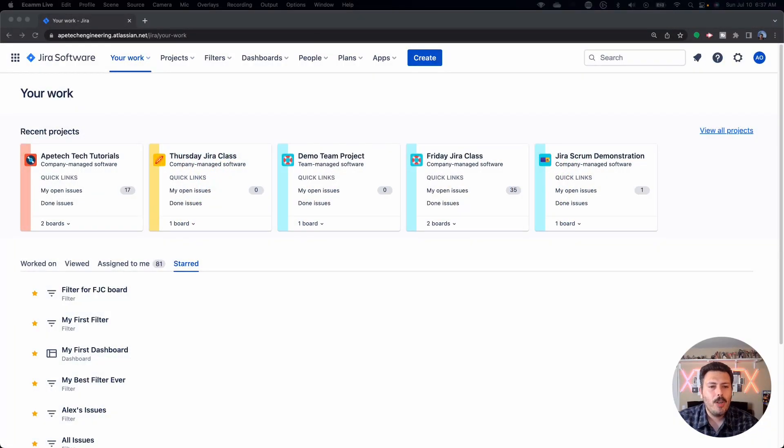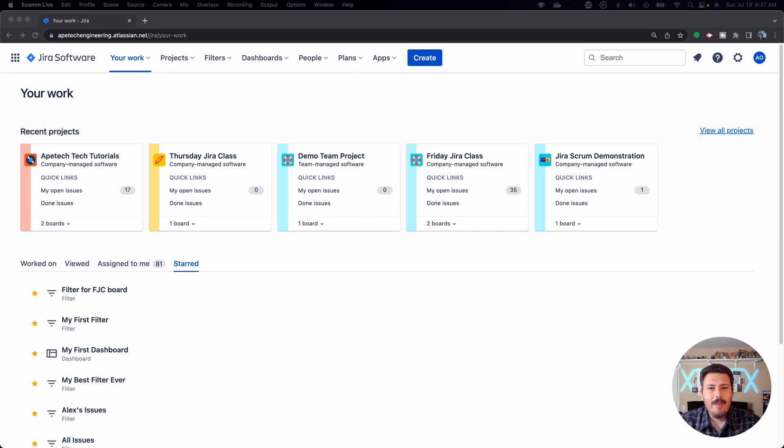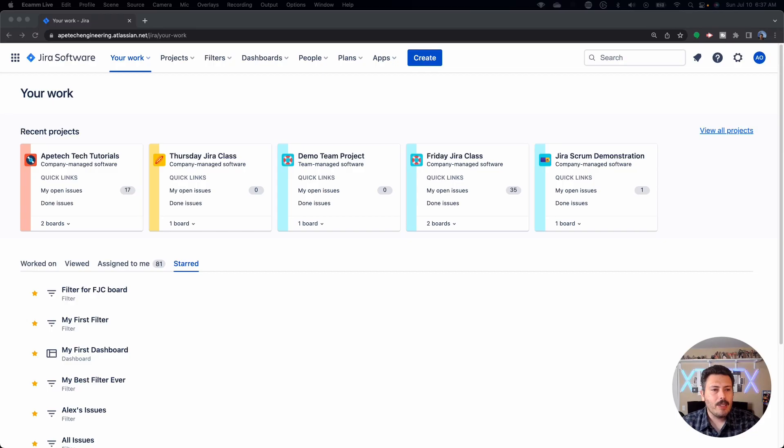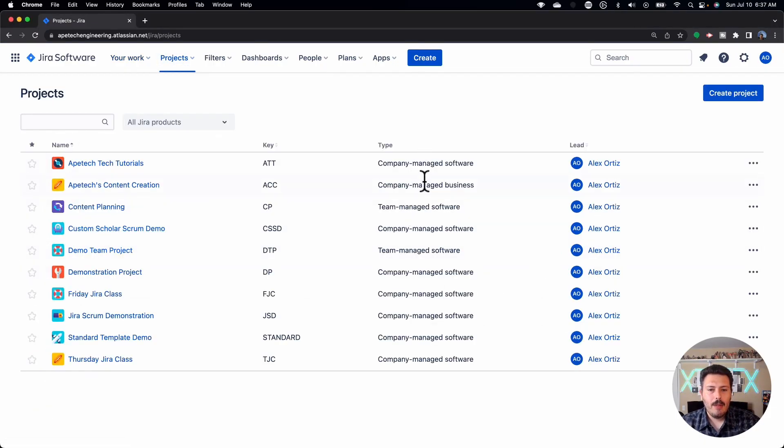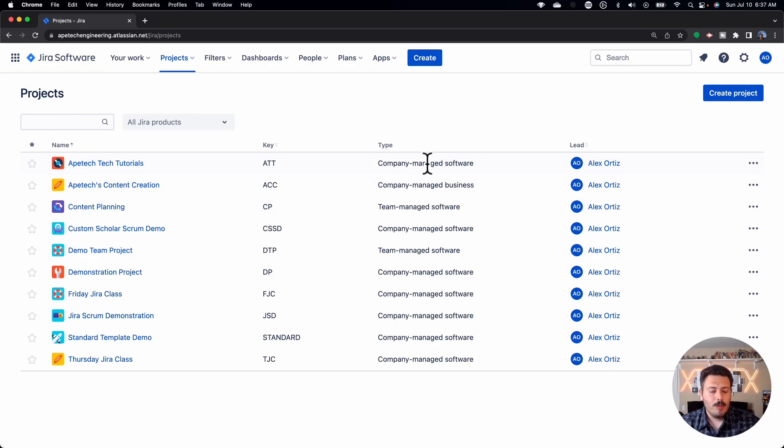The first thing you're going to want to do as a Scrum Master is make sure you're in a company managed project. Team managed will still work for you, but the ideal setup and configuration so that you can get 100% of the entire value of Jira is you're going to want to be in a company managed project. More specifically, we're going to want a company managed software project because even if you do any of the business projects, you're not going to be able to use those because none of those have a sprint board, they don't have a backlog, and they're not agile. Team managed software is my very far second, but either of those two are going to work. But for your best bang for your buck, you're going to want to make sure you're in that company managed software project.